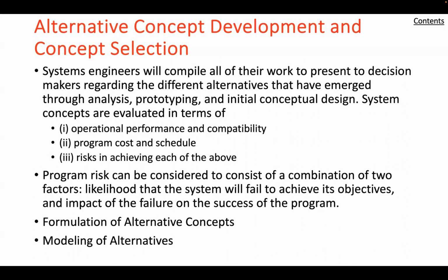There is an inherent tendency, especially in programs where competition among contractors is especially strong, to estimate both cost and schedule of a new acquisition on the optimistic side, making no provision for the unforeseen delays that always occur in new system developments and are often called unknown unknowns.